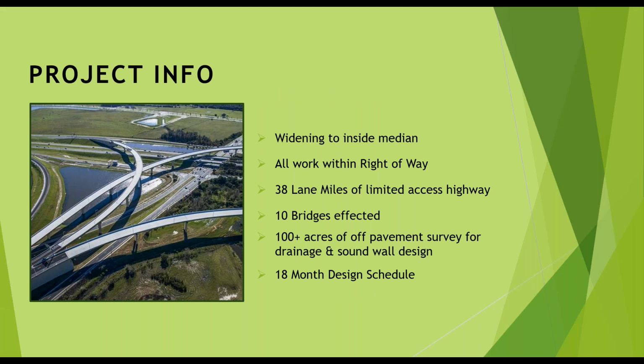Basically, they wanted to widen this controlled access highway to the inside median. All work that needed to be conducted was going to be within the right of way. It was 38 lane miles of limited access highway. 10 bridges were affected. Over 100 acres of additional assets and resources of the client needed to be mapped off of the roadway. And there was an 18-month design schedule.